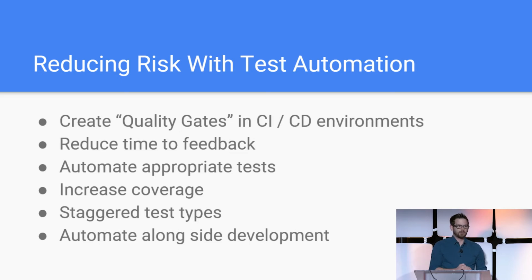If you start seeing high-risk bugs happen in an area of an application, that probably means you don't have good test coverage there. If you continue to see a lot of high-risk bugs open, you need to evaluate and make sure you're running tests in that area. You can also do staggered testing types. I'll go into a little more detail on that in a minute, but the whole idea is to reduce your product and project risks at the same time.